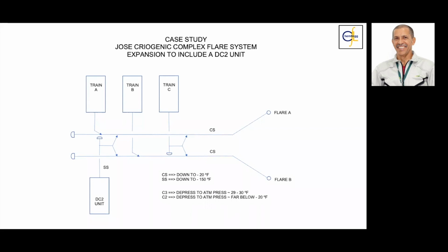If you want an ethane unit, the ethanizer, in your complex, you need to invest in a new flare. Now it's costing money, money that they didn't estimate when they got this proposal. So they needed to introduce a new budget to the management of the owner of the plant, to be approved prior to including a stainless steel flare system.